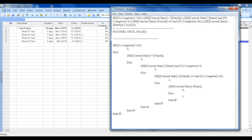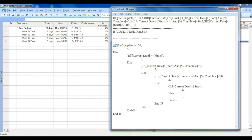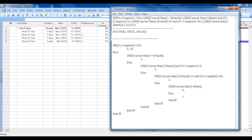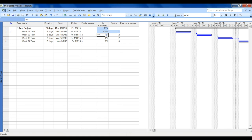So if we split this formula into an if-else statement, that's how it looks like. We have a big IF condition: if 100% complete, that means the task is done irrespective of the date. We want to show it as four, which means we can call this four as green. Anything green is task completed, right?